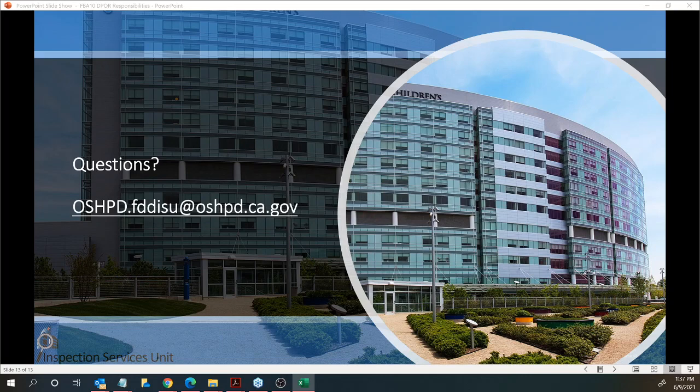For the non-material change, the OSHPD compliance officer, for example, starts to look at all this information. He doesn't have to stamp that it is not an OSHPD review, but if it starts to be suspicious, and a non-material change in reality is a material change, OSHPD can take a look and say, no, this is an actual change order. So modify it into a change order, submit it, and follow the process for a material change.